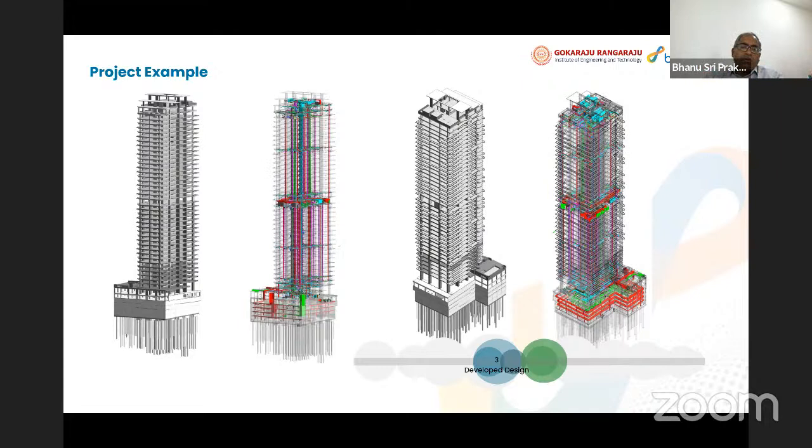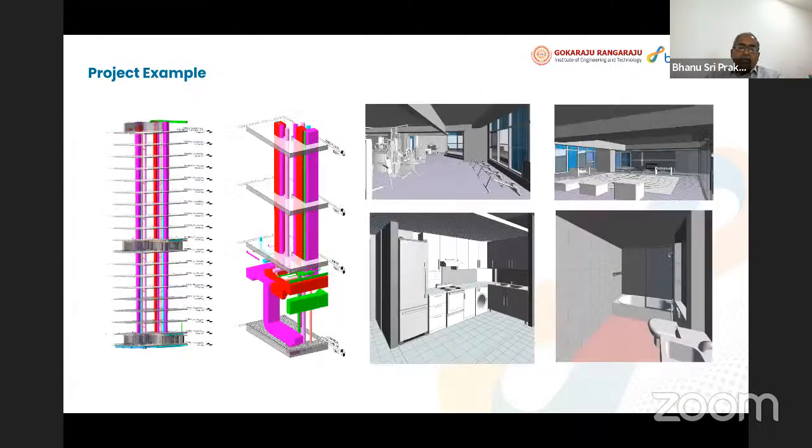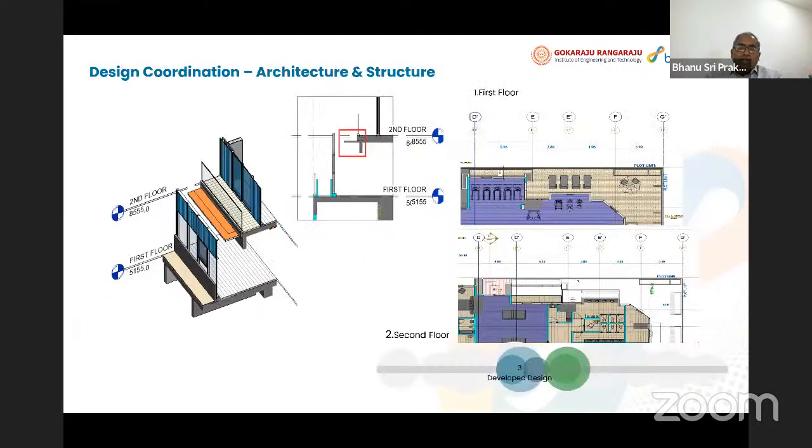They wanted to create more shafts. During this time, they even needed to strengthen the structure. While strengthening the structure, some of the problems, like ramps and beam depths, created trouble. So we developed the entire thing in BIM. You can see these kinds of models were developed, and various issues were identified before even construction.